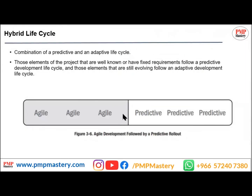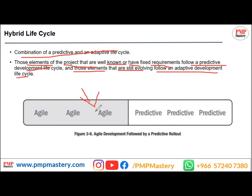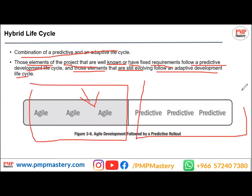The hybrid life cycle is a combination of both approaches. Elements of the project that are well known or have fixed requirements follow a predictive development life cycle, while elements that are still evolving follow an adaptive development life cycle. If any requirement may be changing, you use agile for that portion; if a phase has very clear requirements, you use the predictive approach.